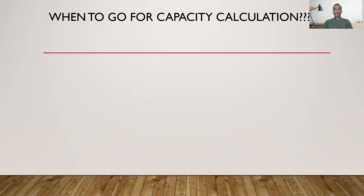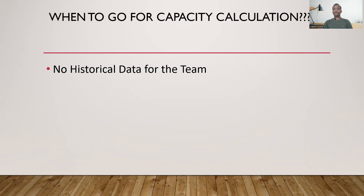When do we go for the capacity calculation? When we don't have any historical data for the team — when the team is starting new with the Agile implementation, or this is the first time the team is doing Scrum, or going for the first sprint planning. That's when we generally go for the capacity calculation. And when the team is a new Agile team, that is also when we consider the capacity calculation.